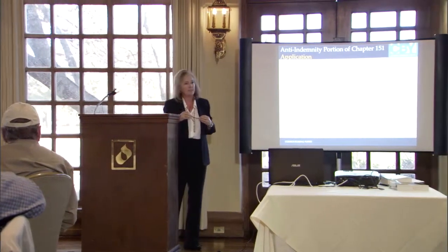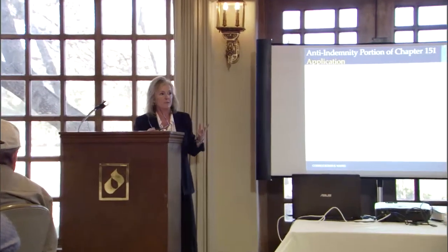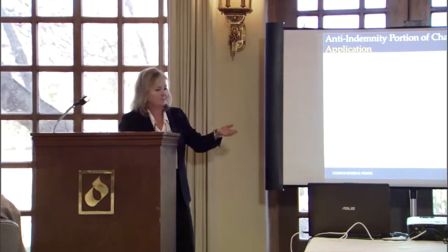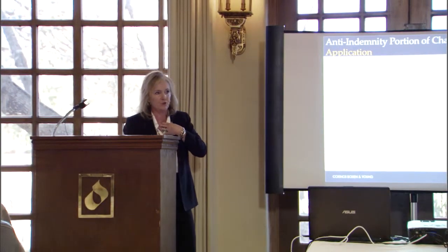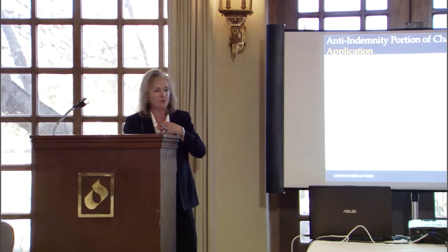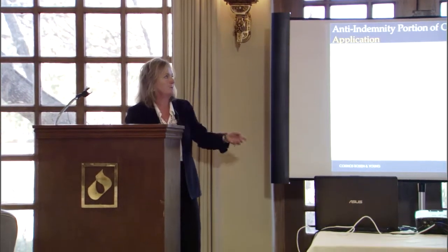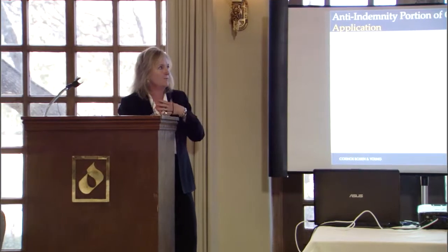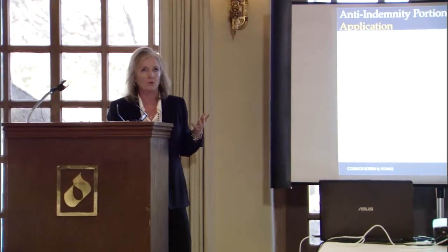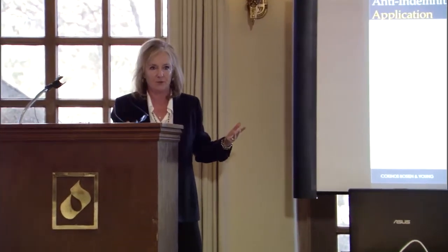The first type of indemnity you had was what we call the broad form indemnity, wherein, let's just say it was a general contractor-subcontractor relationship, I, as the general, asked my subcontractor to indemnify me for everything in the entire world, including my sole acts of negligence.